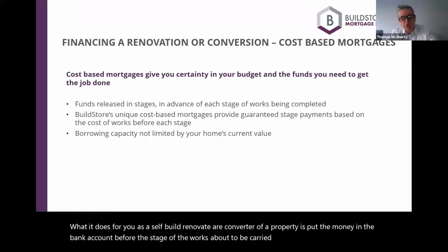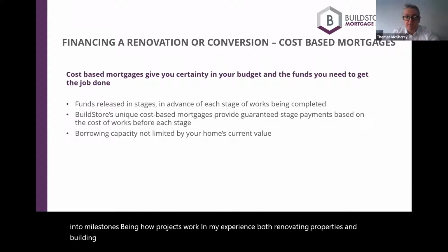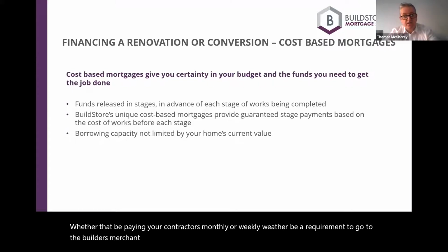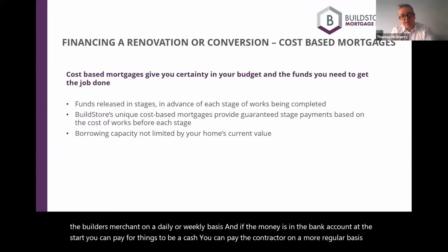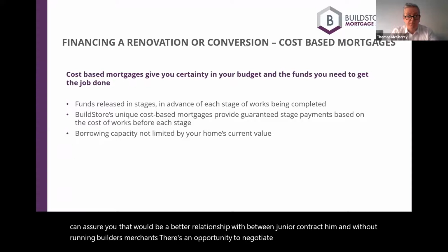Because don't be fooled into milestones being how projects work. In my experience, both renovating properties and building one home, every day is a pay-away day. Whether it be paying your contractors monthly or weekly, whether it be a requirement to go to the builder's merchant on a daily or weekly basis. And if the money's in the bank account at the start, you can pay for things via cash. You can pay your contractor on a more regular basis. I can assure you that will be a better relationship between you and your contractor. And without running builders merchants, there's an opportunity to negotiate better discounts.